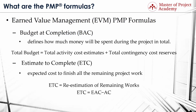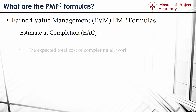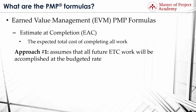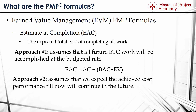PMP formula number 9: Estimate at Completion or EAC. EAC is the expected total cost of completing all work, expressed as the sum of the actual cost to date and the estimated sum to complete the project. We can find the EAC value by three different approaches using EV, SPI, and CPI values. Approach 1 assumes that all future ETC work will be accomplished at the budgeted rate: EAC equals AC plus the result of BAC minus EV. Approach 2 assumes that the achieved cost performance till now will continue in the future: EAC equals BAC divided by CPI.